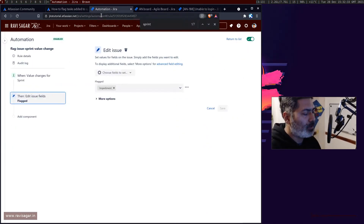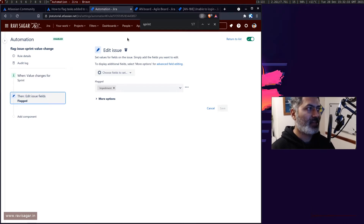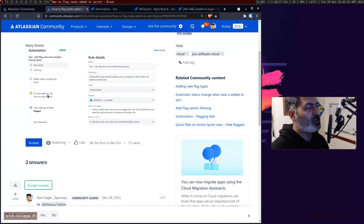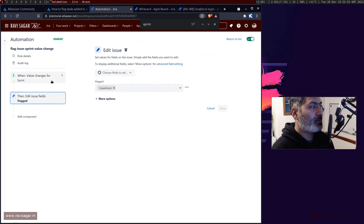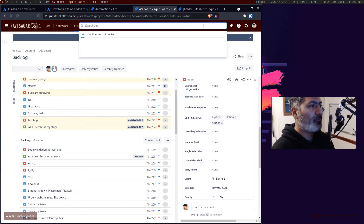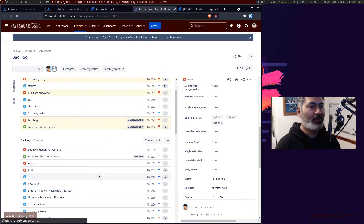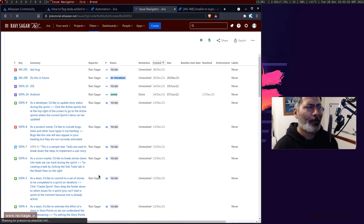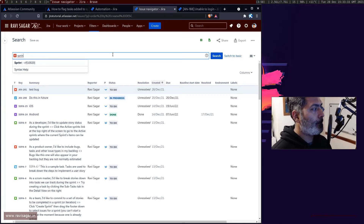The rule will be triggered when you add an issue to an active sprint — or any sprint, basically. You can also add a condition, which is what Melissa is trying to do: check if the issues match a JQL condition. The JQL is 'sprint in openSprints', and you can use this condition to filter issues based on only open sprints.